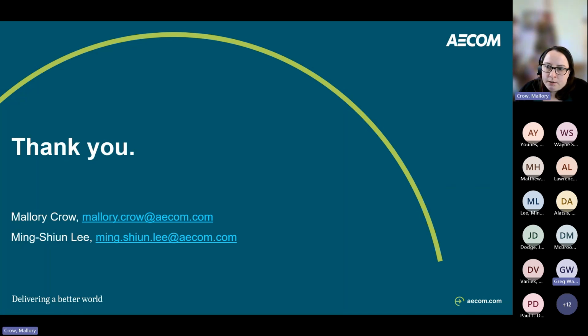I think really the best practice is that, in trusting it, you make sure you don't just push a dashboard. Iowa has tested a lot, so they've spent their time to really test and check before integrating a data set and publishing it. So make sure that you build in time to have an internal test environment and check that the data seems correct. Have an evaluation plan of how you're going to check it. If you're checking probe data, what are you comparing that to, to make sure it is accurate? And give yourself enough time, because one day it might seem right, but then during the snow event or in the middle of the night, something might seem off. So make sure you're checking different times of day and different types of weather events. That's what I would recommend, and what we've heard is: we tested it internally, but we didn't push it forward because we saw things we didn't like.